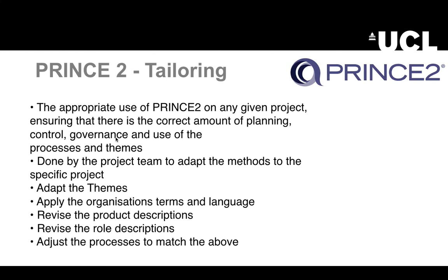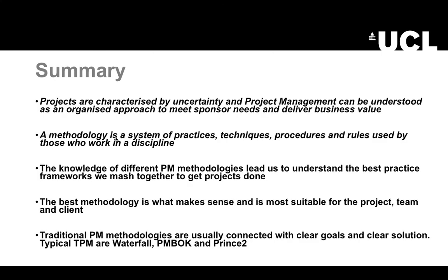So the project team has to adapt the methods to the specific project, and it means adapt the themes, apply the organization's terms and language, revise the product descriptions, revise the role descriptions, and basically adjust all the processes to match the above. Well, here you have a summary of the key points that we have covered in this session.